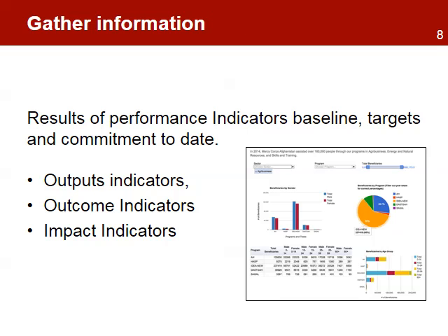The performance measurement framework provides information that is used during the project implementation to adjust plans and strategies. The project manager will use the information collected for monitoring the project progress, especially the performance indicators and their status regarding the baseline targets and commitments for outputs, outcomes, and if available, impact indicators. If performance information is not being used actively, then the project is not applying the principles of RBPM.